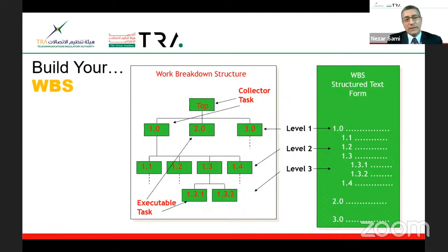So the work breakdown structure, we can build it top down or bottom up. Top down: I am the founder, I come and say, okay guys, I think that in order to have a successful enterprise or a successful startup, we need to follow this type of thoughts. This is top down, as I did right now in the example. Another way, you can say, okay guys, let's do a brainstorming session together.